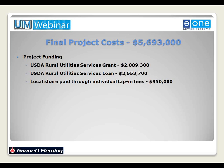And a local share was required, and it was paid through individual tap-in fees. That's the money that the authority had to come up with on their own, in the amount of $950,000, which was actually through a tap-in fee. It was $1,900 per customer.